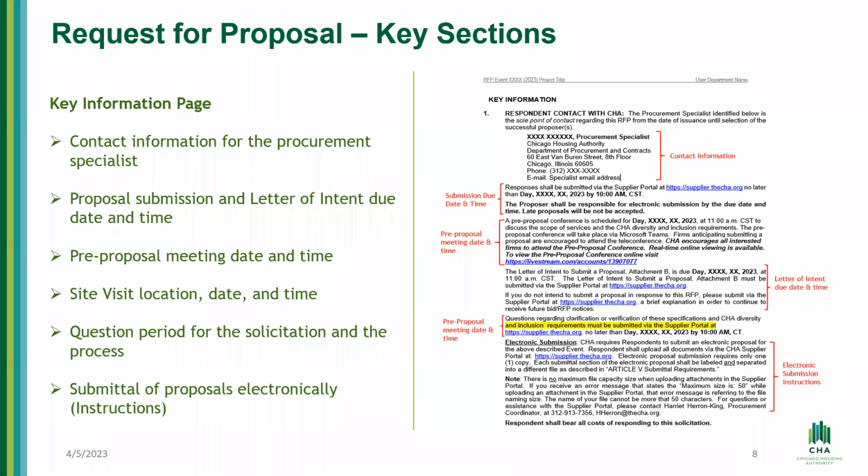The questions period is pretty much the time frame that you will have to submit questions to the procurement specialist. These questions have to be submitted through the supplier portal. So again, if you're not registered, you have to be registered in the supplier portal. After the question period, the procurement specialist is not obligated to answer your question. So you will need to keep in mind those dates and times to submit either your proposal or your questions.